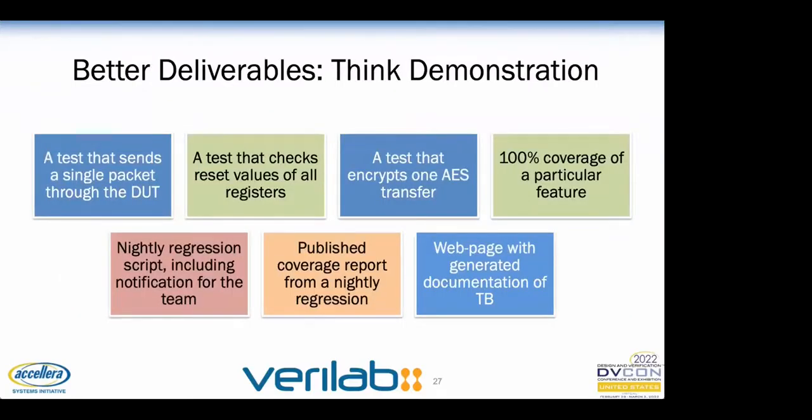It can be very helpful to clearly define how a deliverable will be demonstrated. By keeping the focus on a demonstration, we're keeping the focus on what is actively being done rather than on a state of being. Most often this demonstration will be a test or a set of tests. We're not advocating a directed methodology, but having a single test to point to as proof that a deliverable is finished can be very useful.